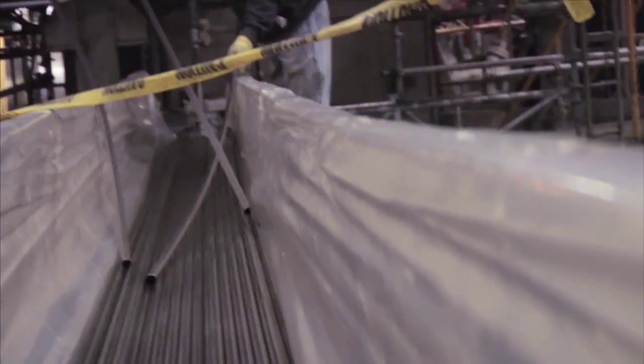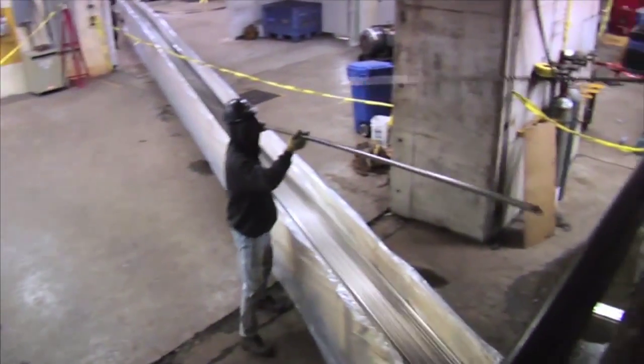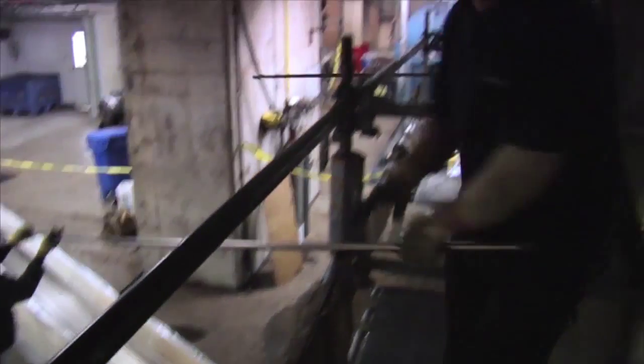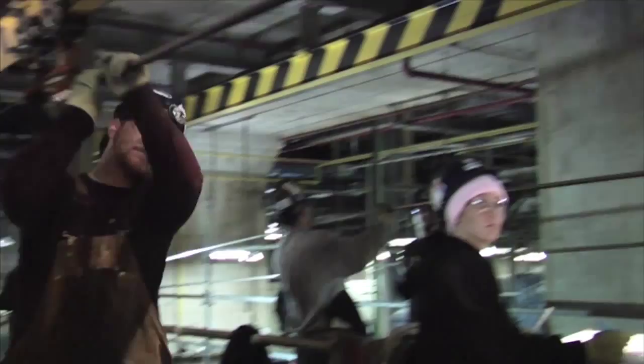And then we go in and we roll tubes in clusters of 10, maybe in 8 places or 10 places on a tube sheet, making sure the tube sheet is good and straight. And we go to the back end and do the same thing with the same tube, so now we know we have the proper alignment between the tube sheets.